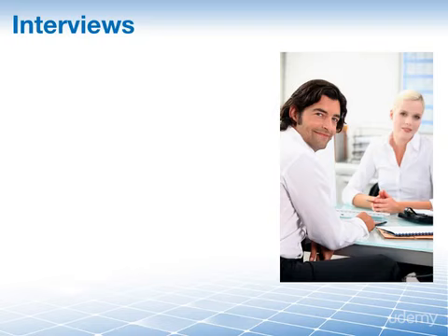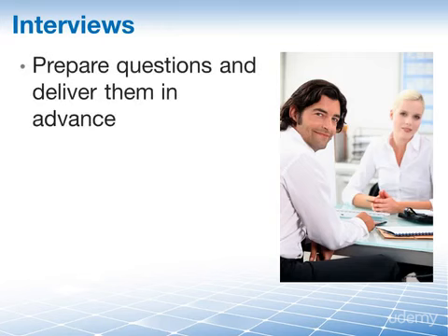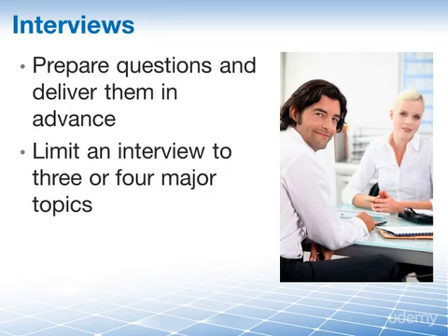First of all, when interviewing many stakeholders, prepare the questions and deliver them to the interviewees in advance of the actual interview. Limit an interview to just 3 or 4 major topics, depending on the length and quality of the answers you receive.